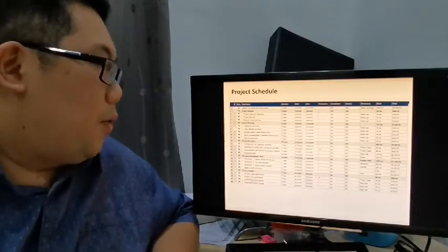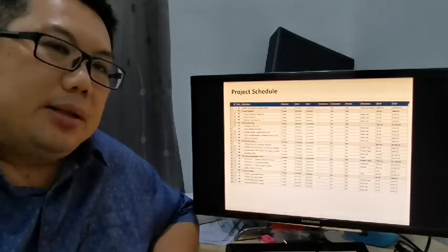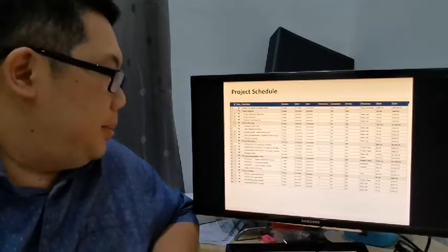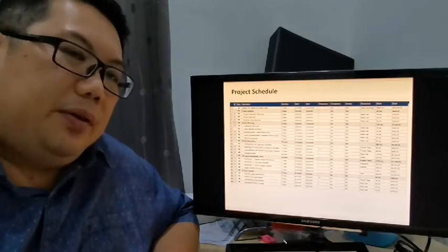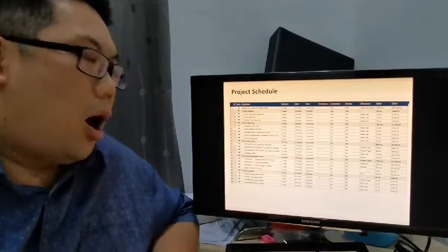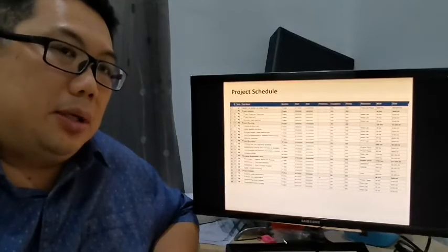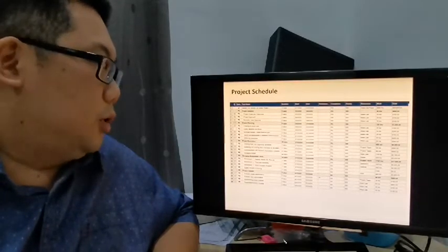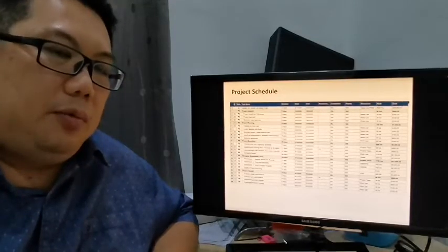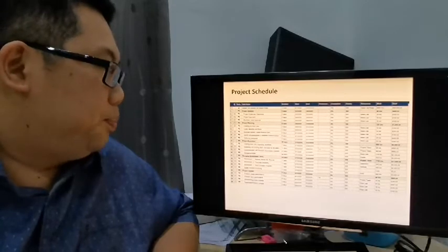After the planning, we move on to project execution. In project execution, we create the tasks and organize the work stream for each of these 3 major work streams, explain and brief all the team members on their individual tasks, communicate back to the stakeholders or the resident association on progress, and also manage our budget well in order to achieve our objective.